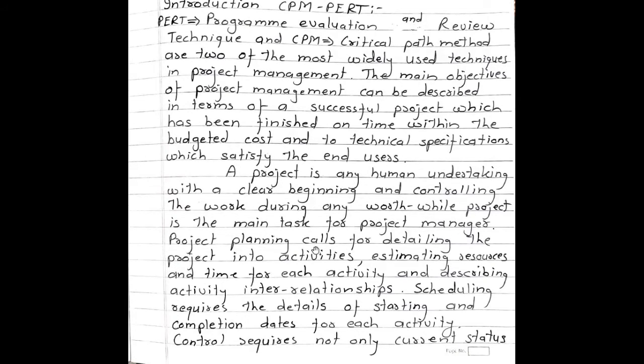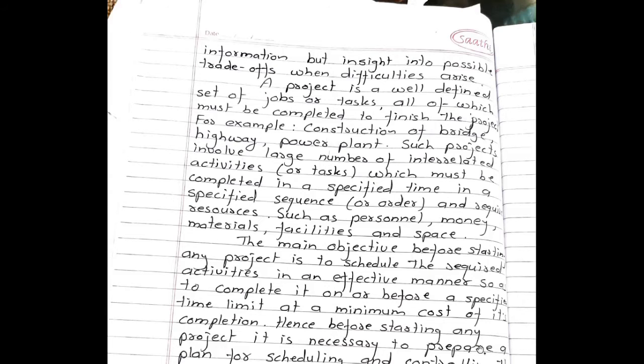Project planning calls for detailing the project into activities, estimating resources and time for each activity, and describing activity interrelationships. Scheduling requires the details of starting and completion dates for each activity. Control requires not only current status information but insight into possible trade-offs when difficulties arise.